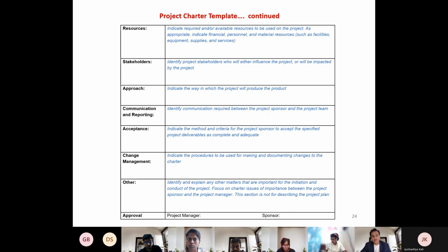I will evaluate every change request, and on evaluation, if we find it is appropriate and beneficial, I will accept. And once I accept, Jaya has used the second word, that there will be certain steps to follow to accept the changes. So you will say we will follow certain steps in which we will come to you and say these are the change requests which seem to be legitimate, and therefore we are requesting you to accept these changes. And that will come either as a variation of the initial plan, or it can come from the contingency. So you will talk about the change management.